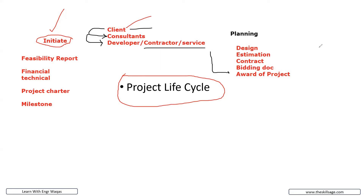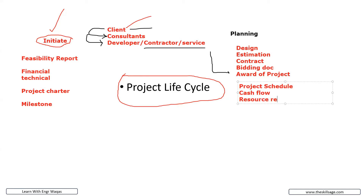After the project is awarded, within the planning phase, the contractor is going to produce a project schedule. You can relate how a project schedule is compiled using Primavera P6, based on the contract and agreement. From Primavera P6 you can also produce cash flow documents and resource requirement plans.